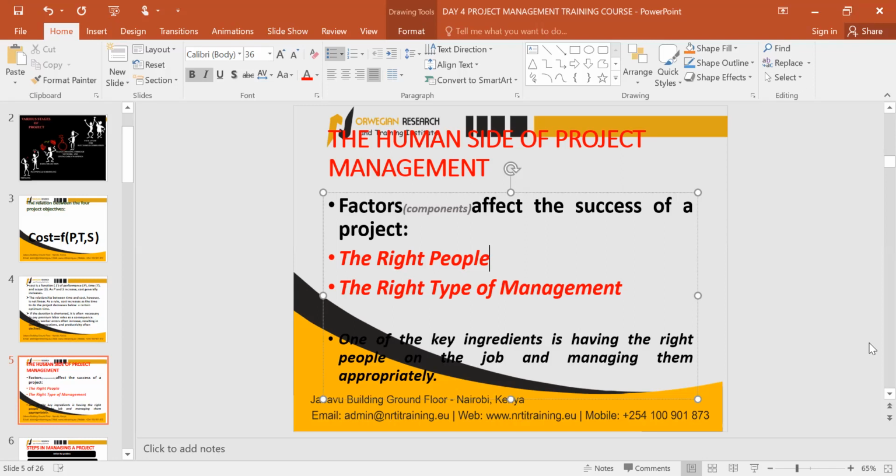With cars, you take your car for a checkup, not necessarily because your car is not doing well, but just to ensure that the efficiency of your car is good. That's exactly how we are going to treat the machines that we are using in the project environment. If you are using those big machines for construction, they just need to be monitored often, not necessarily because they are in a bad state, but so that we don't have a breakdown, because any breakdown is going to bring delay in the task that was supposed to be done.